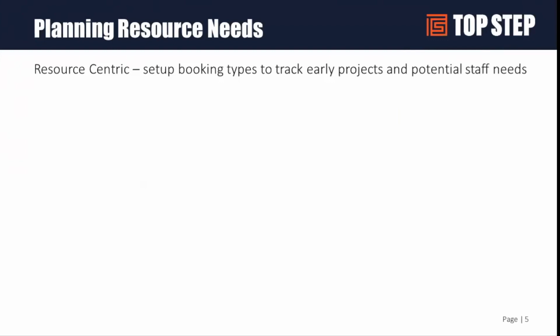By definition, when you put a resource on a booking in the system, and some of you may have renamed this term booking to allocations or staffing or assignments, those are all different terms, when you put somebody on a booking, by nature of that, it is a resource-centric booking. But the booking itself can have this concept of a booking type, where you're scheduling the resource, but you're tagging that individual schedule piece as what kind of scheduling piece it is.